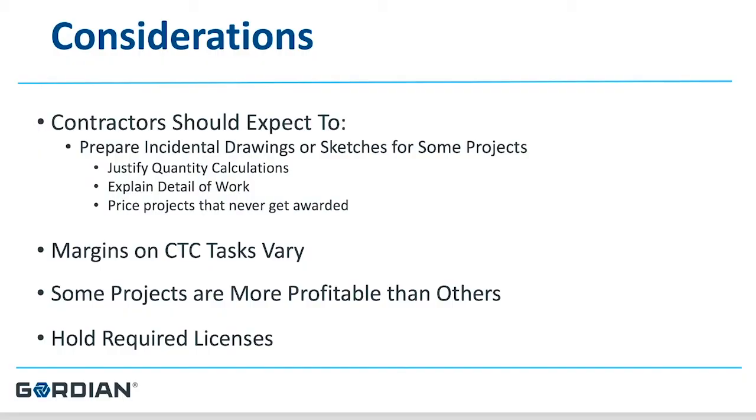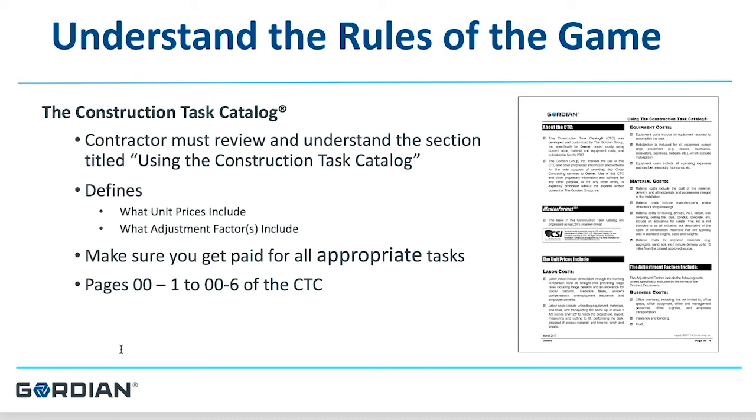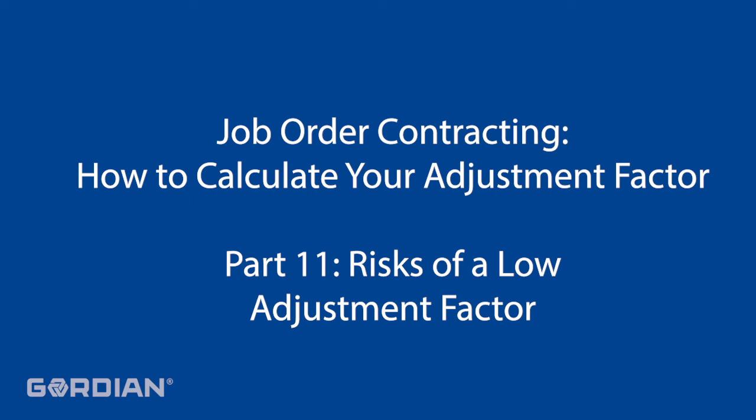Some projects you price will be more profitable than others. Also bear in mind you will have to hold the required licenses as specified by the owner throughout the solicitation. Be certain that as you put together each proposal you are catching everything related to that scope of work — do not leave anything out. If you're doing excavation, be sure to pick up backfill and compaction; if you're putting in a water line, pick up the insulation and all the hangers. There will be a proposal review process for each proposal you submit, giving the owner an opportunity to review for accuracy and to point out when you may have left something out.